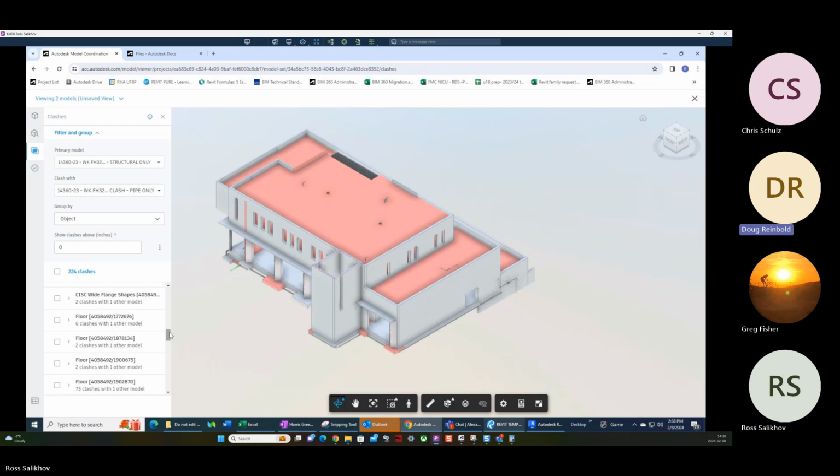I think, like you say, we need to master this first. Get it to a point where we know we can do it. And then that'll also give us a little bit of a background and database as to how many hours we're actually spending doing the coordinating professional's job. And then we can put a number to it. Because if right out of the gate we just say, yeah, we can do this, and we haven't really tried and tested how much time it takes, we're either going to oversell or undersell and get ourselves in a world of trouble.